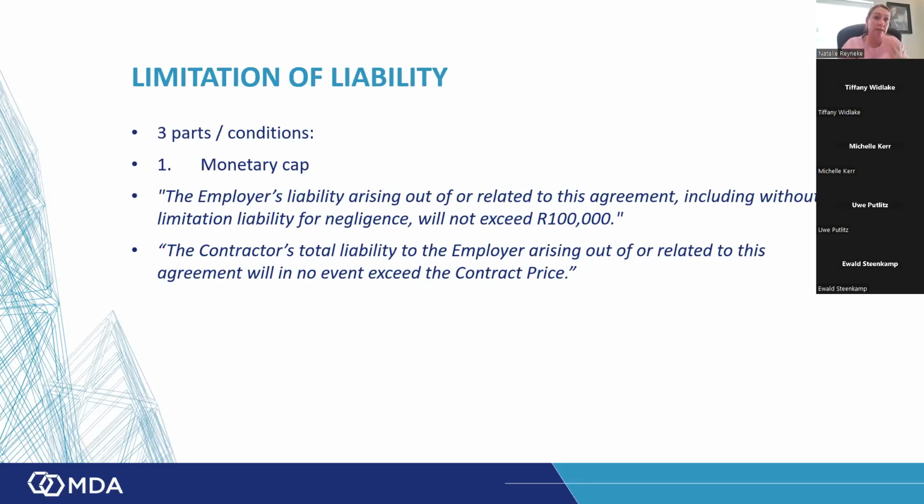I've got some clients, for example, that are very risk averse. I don't know what they've done wrong in their lives, but they say, no, we are not executing this project unless we get a 10% cap on liability. And that's it, they refuse. So if the employer wants to employ them, their cap is 10% liability and they are not budging.